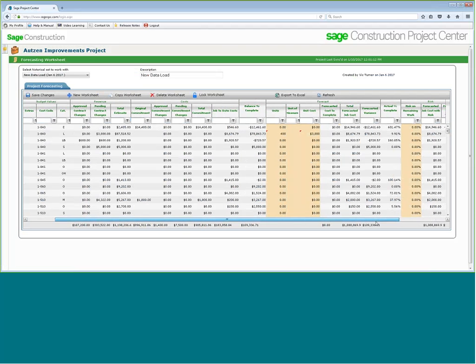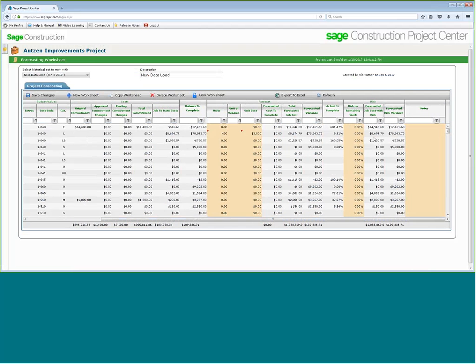We even have a spot for remaining risk on work. So if you feel that there's some risk that you're not going to get things taken care of, you're going over budget potentially, not necessarily going over budget, but you have the potential risk on the remaining work, you can do just that and put your notes and say why. And this will sync back in with the Sage accounting, so people on both sides of the coin will be able to see all the information.